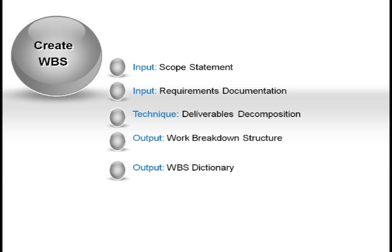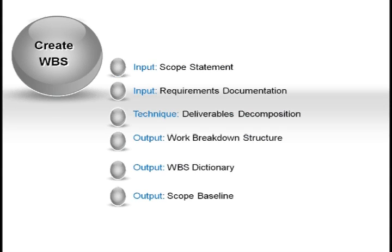Your program manager will likely be able to help you with this if it isn't obvious from your project framework. Once you have the work breakdown structure, WBS dictionary, and scope statement completed and signed off, you can save them as a baseline, enact change control, and start to manage scope as the project moves forward.